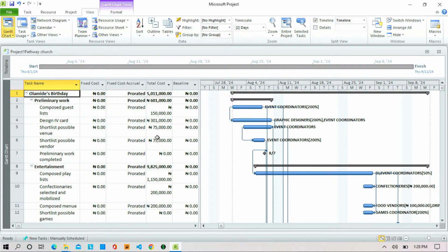Thank you for that question. Now, if Emeka is the one that defaulted, he will bear the cost. But another one is this. They could say, even though we agreed to use Dulux, we have now found another paint called Super Dulux. Emeka aligned with what they wrote, but they now say that they want something more. In that situation, they bear the cost. But for the one where Emeka didn't follow what was documented, he bears the cost. Do you get it now?